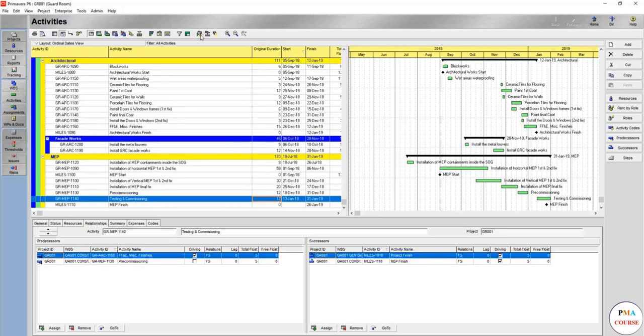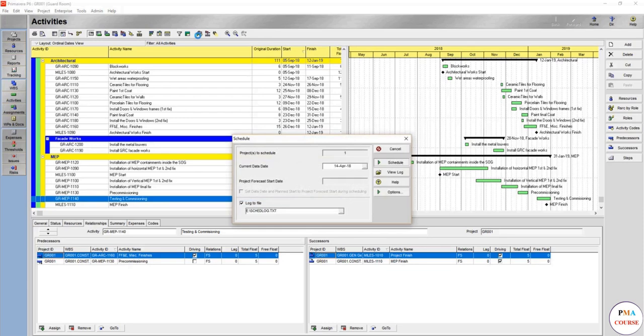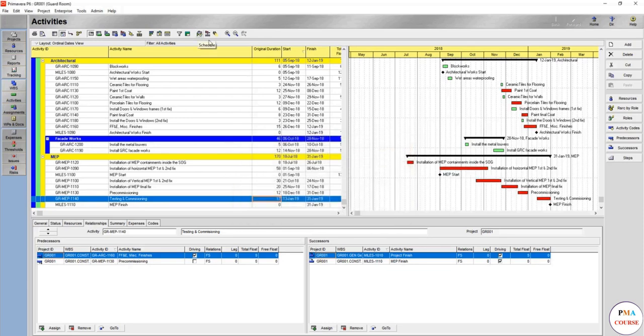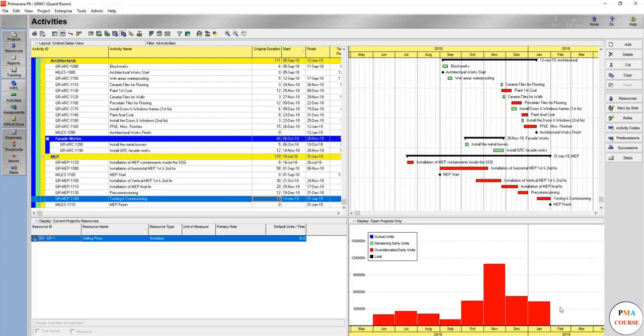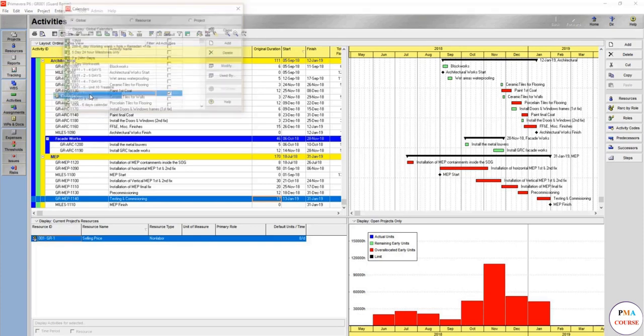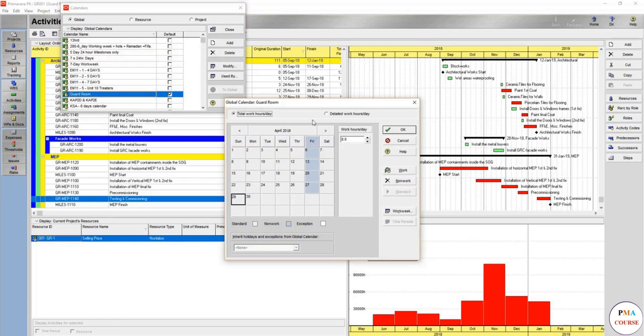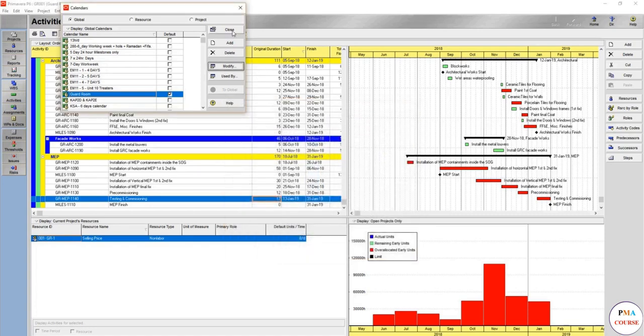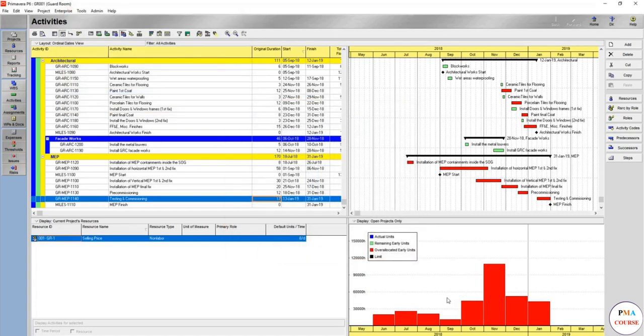And now it will be the same critical path. That's actually a good exercise to understand things better. So now we have adjusted this, still remaining September. You might accept this, especially if you check the calendar, if there's a lot of holidays or not. Go to your calendar, check the month of September, and there's not much. So in that case, you can adjust it.